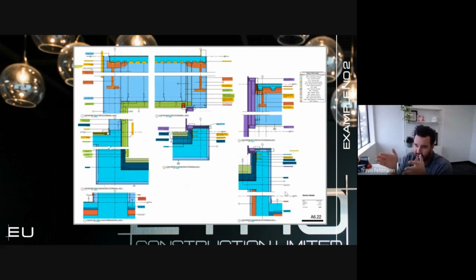So then that way it gives the trades enough time to go and coordinate with their own departments or external subs, and make sure that they know that this is the way we want the job priced. So then those subs can make sure that they price to our trades with that pricing in mind, so that they're carrying the full scope. So again, do this early. Hopefully within the first week of sending out a tender, this document goes out fully fleshed out with all these details and the scope markups, and use it basically as an addendum, if you will.